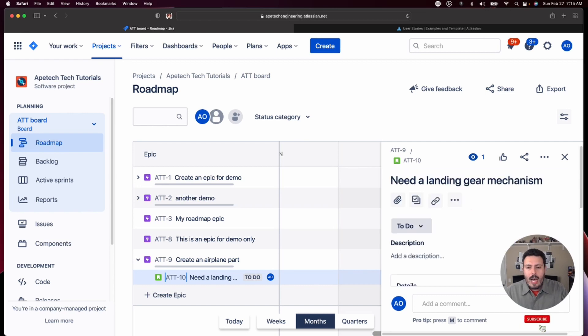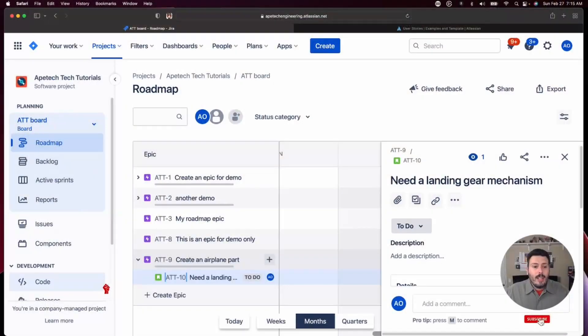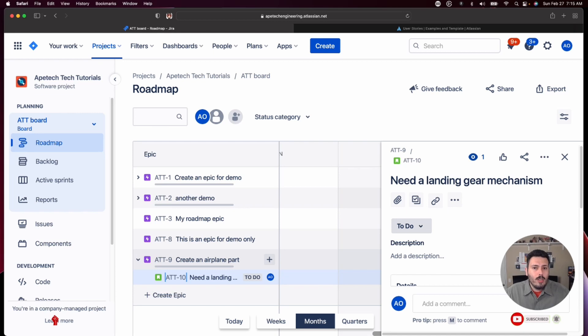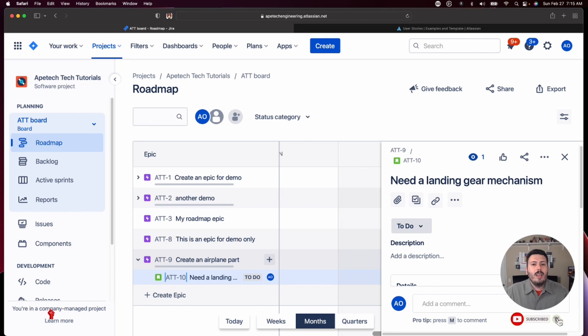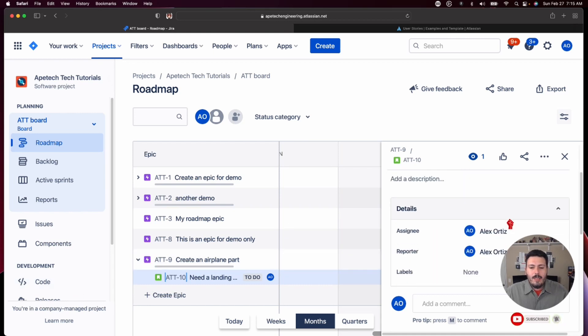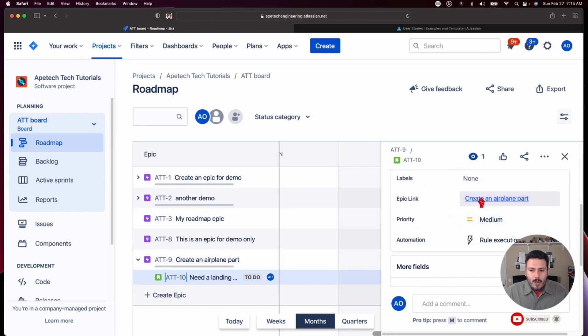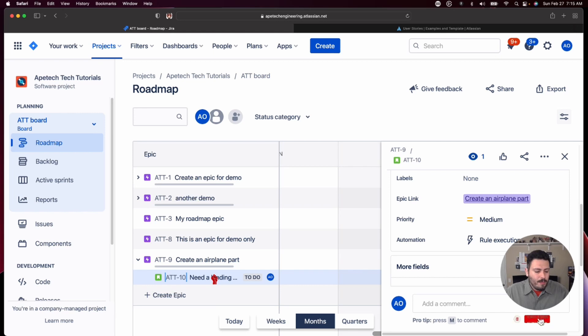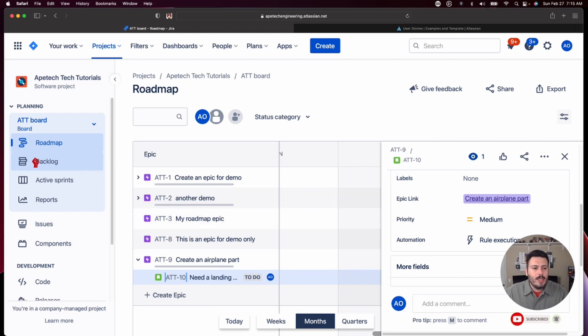Now I do want to mention one thing, if you're using JIRA and you're in a team managed project, you're not going to find this. The way JIRA does epic and child relationships there is very confusing to me. But in a company managed project, which is the type of project you want to be in, and you can see down here which one you're in because this will say company or team. This is the way it should work. This is the way you want to be doing it at least for now until Atlassian changes things. This epic link is super critical to establishing that relationship. So that's one way, let's jump into a second way of doing this.